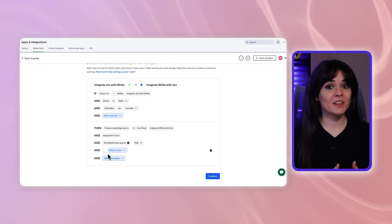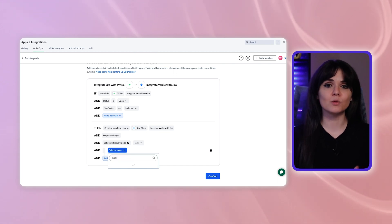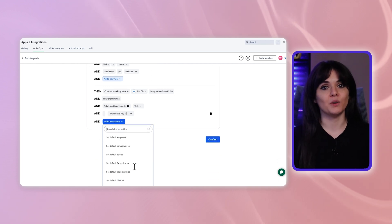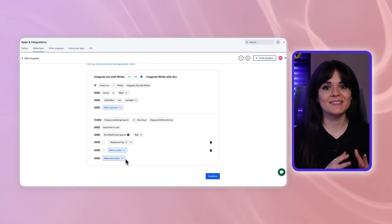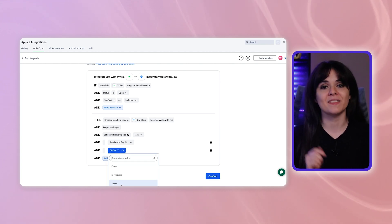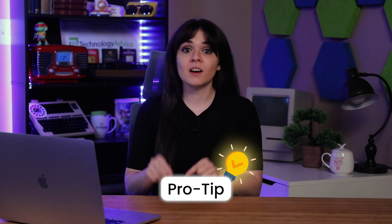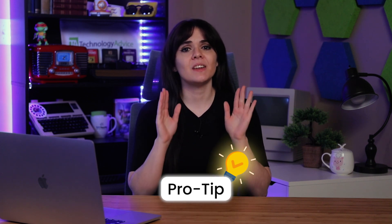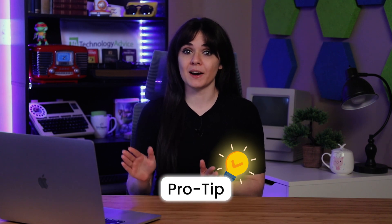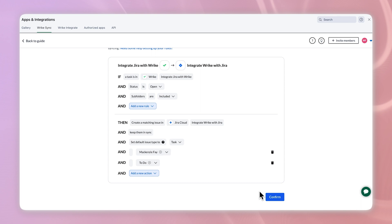That's all you need to do technically to connect Wrike and Jira, but if you want them to communicate effectively with each other, you'll need to create some rules. Do this by filling in the criteria for your if-then workflow, and you can add as many criteria as you like in both the if and then sections. You can also add as many workflows as needed. For my example, I'm just going to add the rules set default assignee to myself and set default issue status to to do. So when a task is made in Wrike, those two defaults should appear in Jira when the task is reflected. Quick pro tip: when setting these rules, make sure the people creating the task in Wrike or Jira are aware of what criteria are needed to fulfill the rules. Even if one detail is missed, that info won't be shared between the software, so be careful. Once you've finished building a rule, hit confirm.